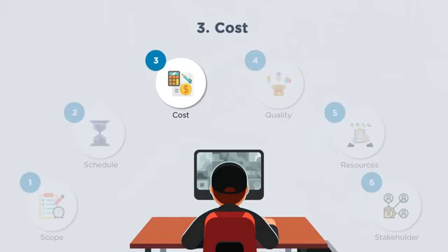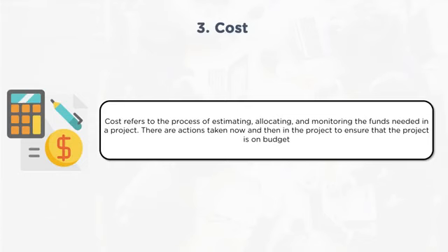Third is cost. So as we know, to do any project, it is very essential to ensure the project happens within that budget. So project cost is estimated initially, then that estimated cost will be checked in terms of whether the assumptions and considerations are right or wrong, and whether that much monetary resource is really required for the project. And then after understanding the justification and obtaining the clarity, the budget, the monetary resources, are allocated and confirmed, approved. Then it will become a budget.